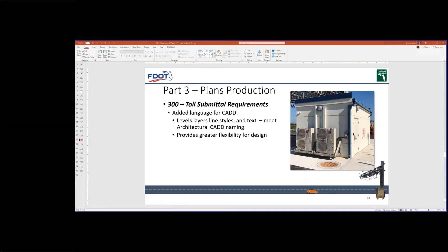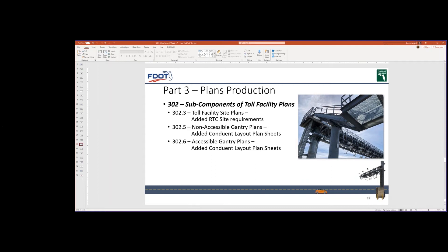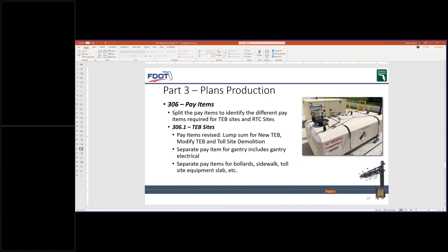Some CAD modifications were made to create greater flexibility during the design development. And this will help with the CAD compliance. For some of the CAD files that are created for tolling, we know that there's not a standard for that. So we're trying to create some greater flexibility for the CAD compliance. We've added the RTC and condo tolling requirements to GTR part three as well listed in these sections. Through coordination with central office, we've also developed the toll site component pay items rather than the outdated lump sum pay item approach. This will help with the costs and identifying the components at each toll site.